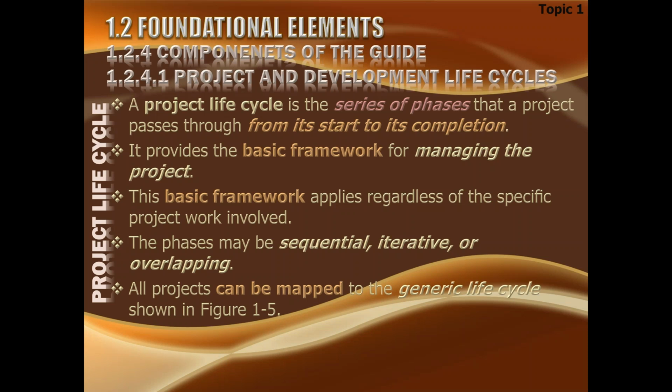The phases should deliver their outputs, their deliverables, products, and once they have all been achieved and vetted, only then you are allowed to move on to the next phase. This is the role of the phase gate. The phase gate between phase 1 and phase 2 is where you get the permission to move ahead.